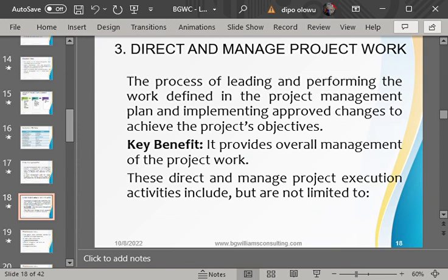We now said that the project management plan is the central document, take note of that word, for managing all the plans in the project. We also said that the project charter is the only document that cannot be changed. If that document is changed, automatically we are creating a new project. But note, though the project management plan is an official document, it can be changed. So the only document that cannot be changed is the project charter. Every other project management document can be changed and adjusted.